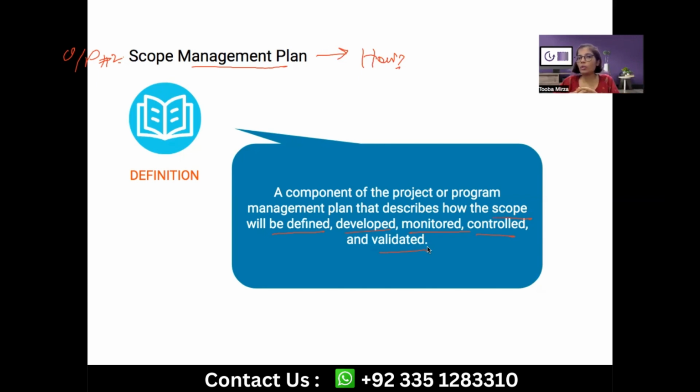First, you gather your requirements, because without requirements there is no scope. Scope is created on top of requirements. So you need to have your requirements first based on the requirements management plan. And then you need to have your scope baseline based on the collected requirements. This is how it works. Like I said, process by process.